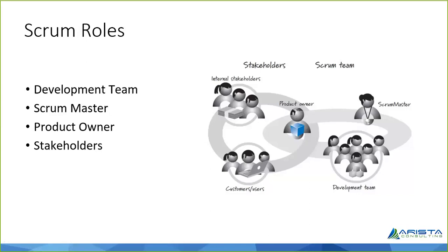Scrum Master need not be technical. He may not understand technical aspects. Even if there is a technical problem, the Scrum Master can solve it because he has access to the entire organization, where he may procure someone on loan who is a subject matter expert or a technical expert, and that person can guide the team. That person will not participate in the development activities. That person will guide the team and sail them through whatever hurdle they have. Remember this point, once the development team is formed, there is no other external party who interferes with that development team.